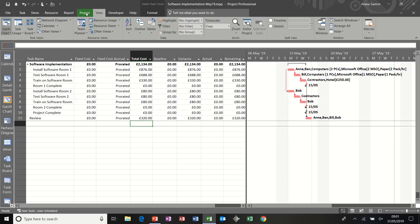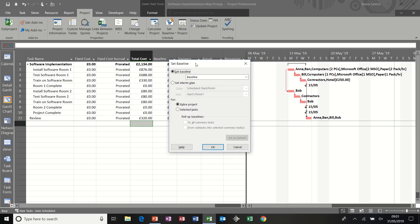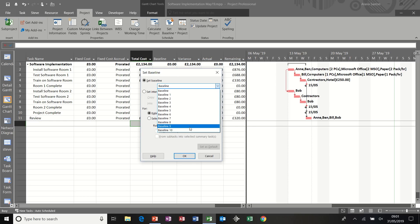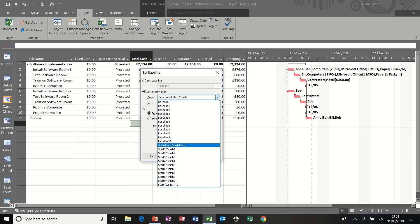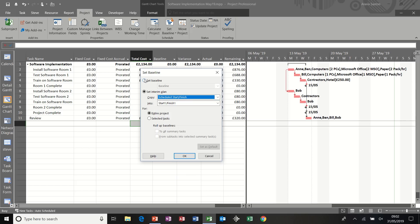To save a baseline you go to the projects tab, set baseline and then set baseline and then you have the option to save a baseline. You have 11 options altogether. In older versions of project there was just one baseline option and you had several interim plan options, which basically just save the start and finish dates. So baseline saves the start and finish dates, but also time phase work, costs and resource allocation.